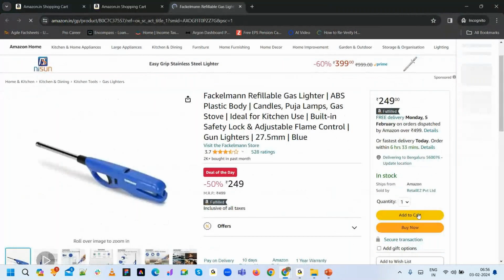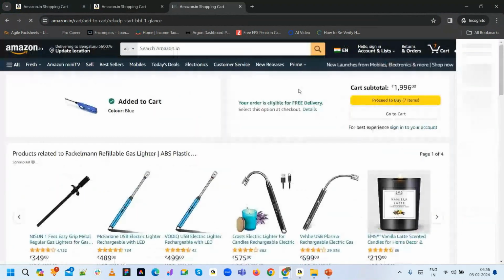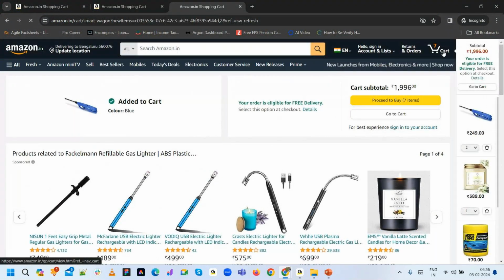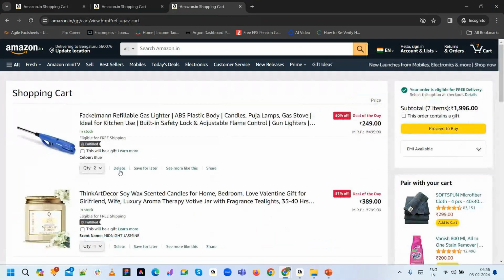So I can select some item, it is giving me this button, add items, and that's the reason that if I'm building a feature called delete, it will work. Imagine my developer never built a facility to add and I'm developing a facility to delete. It is impossible to test because there is no way I can first add, so I can't even test the delete. Now there is a relation, a dependency, correct? I can pick up this story of delete only once the story of add is completed.